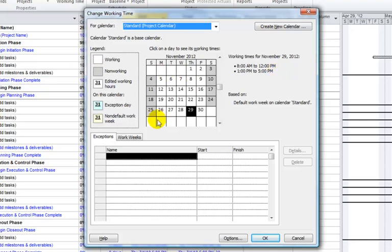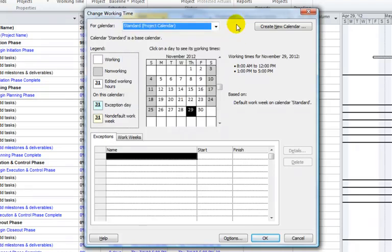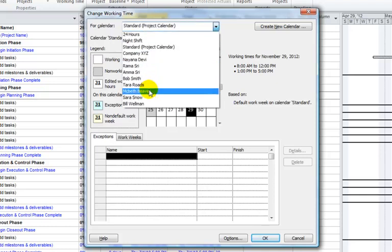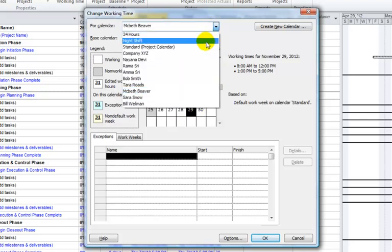We're able to assign a calendar to a project file to specify the working times for the entire project. Typically, you can get a copy of the human resources calendar for the corporation, put in all of the holiday times common among the organization, and add that into the project calendar. Likewise, for specific resources in your schedule, if they have vacation time or a work exception due to a holiday, you can set a calendar for them by selecting their name, selecting the day and time, and configuring it the same way we're going to walk through now.